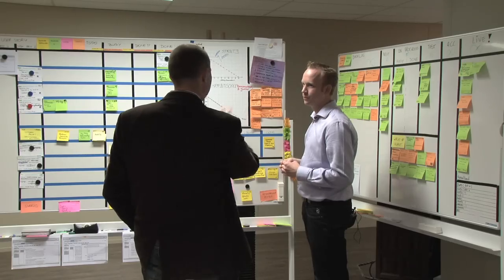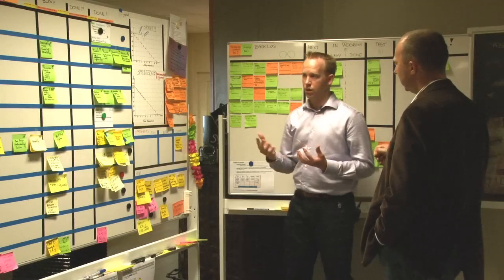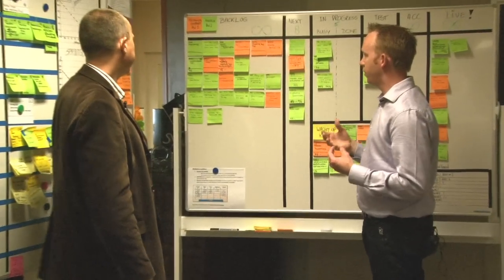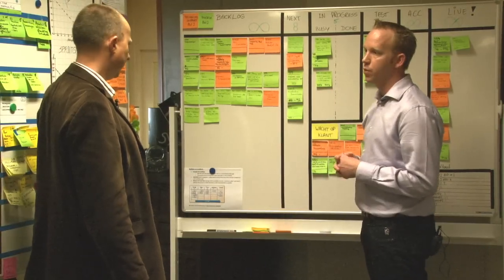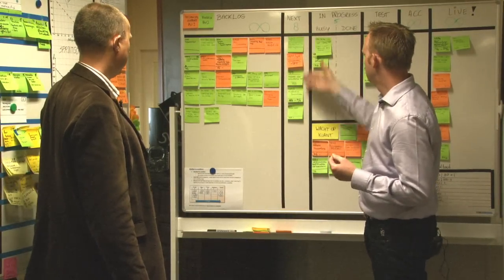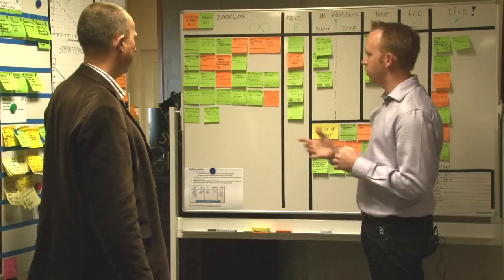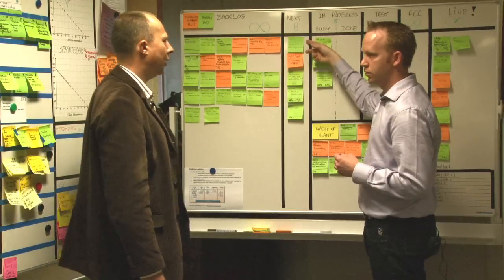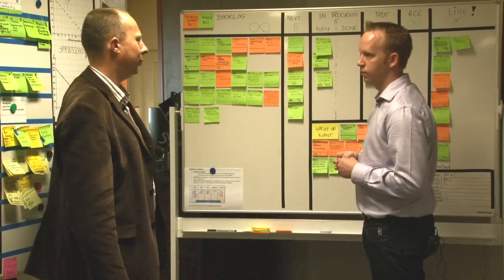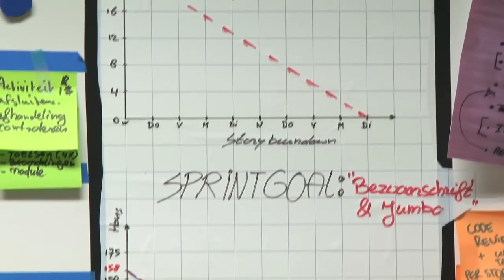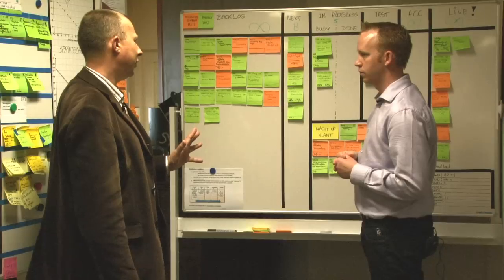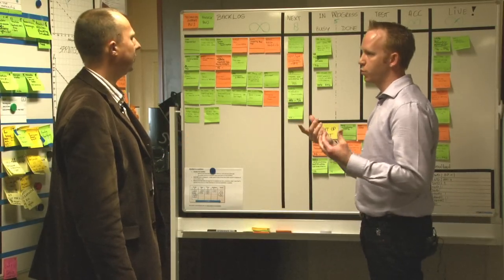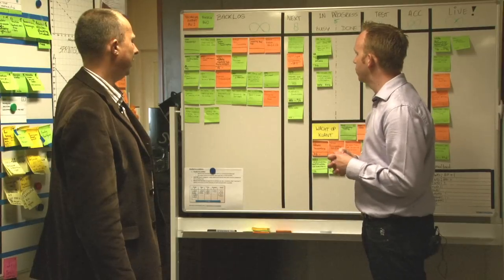Cool, cool. And then how does it work in the combination with the KanBan board? Well, we use the KanBan board for maintenance, and during our sprint planning we buy time from our developers to work on the KanBan board, so we can work on the top priority issues first and we don't disturb our sprint. And who prioritizes this? Is it the product owner? This is internally our help desk. Oh, the help desk prioritizes the work to be done. Okay. Yes. And the amount of time they have for that? Who decides that? That's decided upon by our operations manager, which is the delegated product owner of the product that we need to work on.